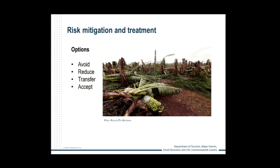For example, to reduce the risk of losing stock and equipment in the event of a flood, a retailer might decide to find a place on higher ground where they can store items from the business off-site. You might also decide to seal the doors and windows with heavy plastic and sandbags to prevent water getting into the store.